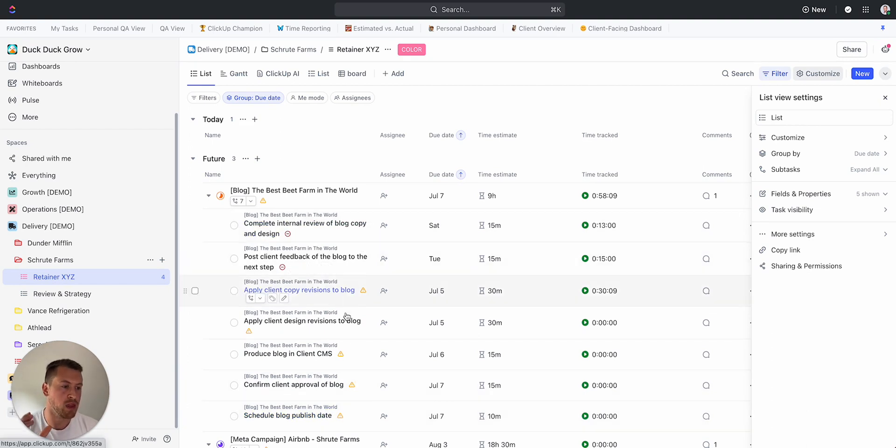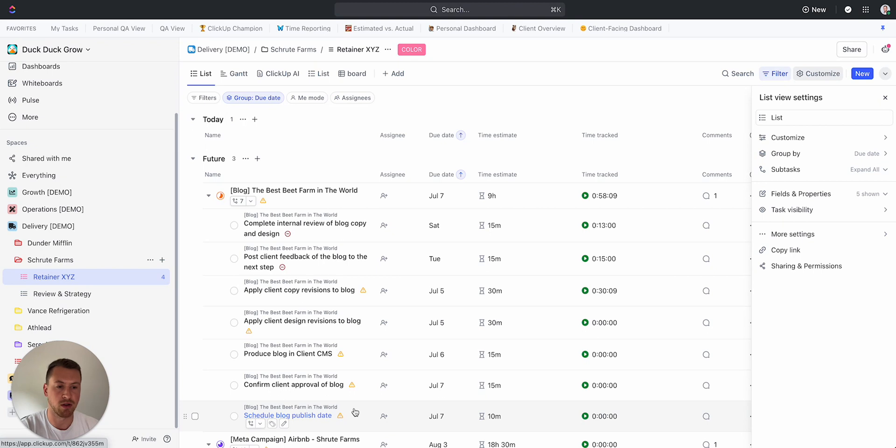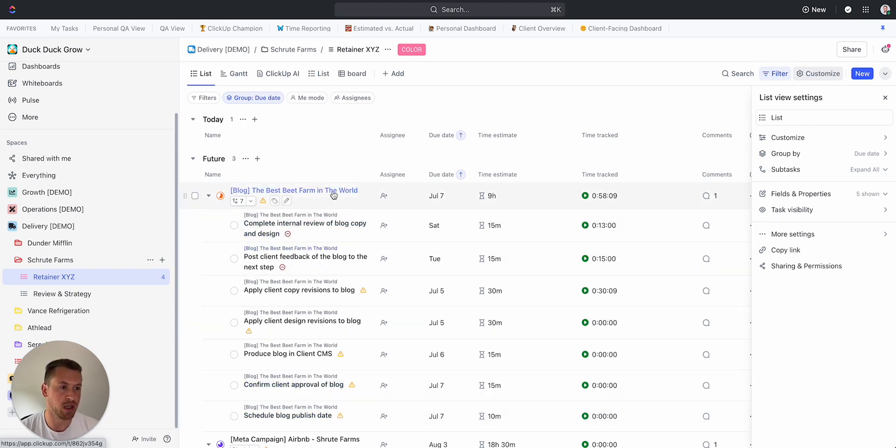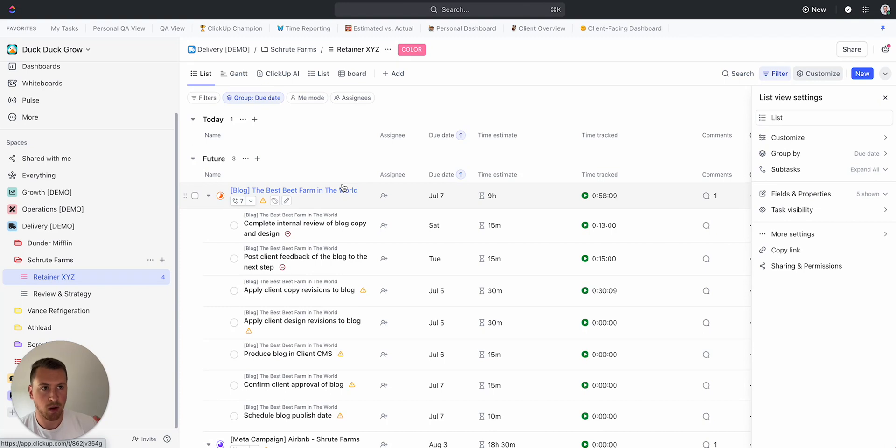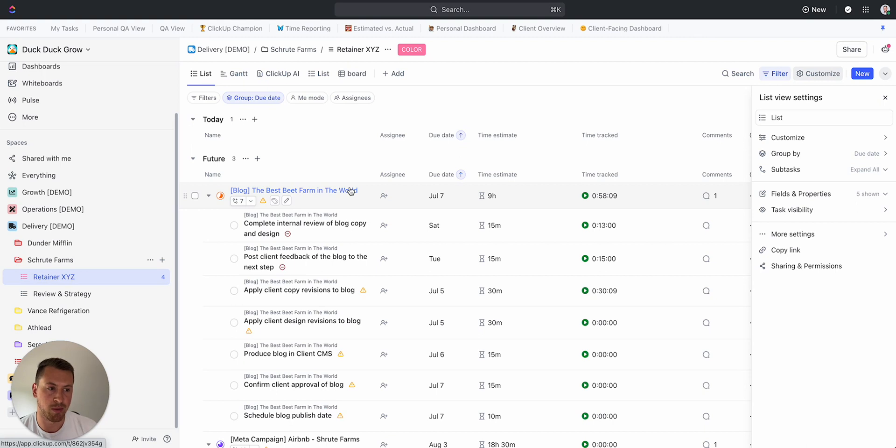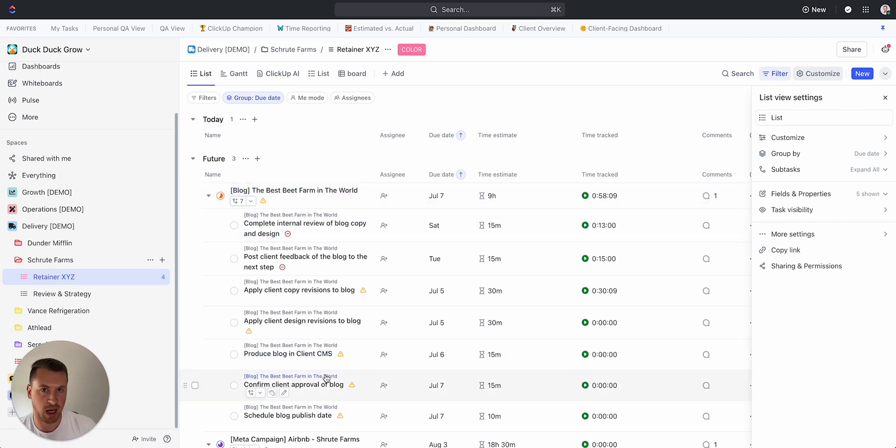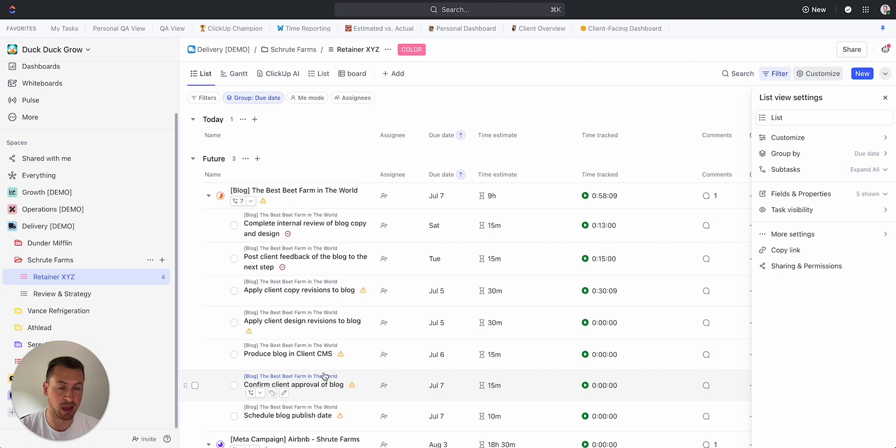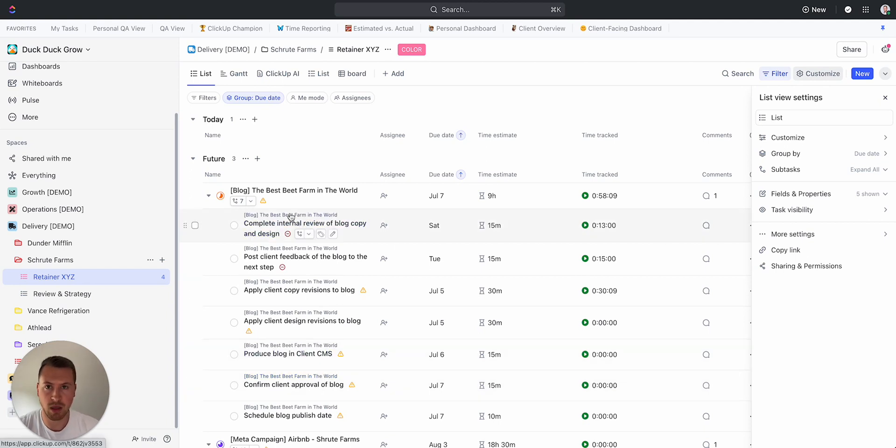These are all the steps that this work is essentially going to be passed across team members. All of these, once those are completed, that's actually going to complete the whole parent task. So again, we're grouping together all of our work by deliverable. The deliverable name is going to be the parent task, and all the subtasks are the actual action steps that are taken by the team to complete that blog post or search campaign, whatever it may be.